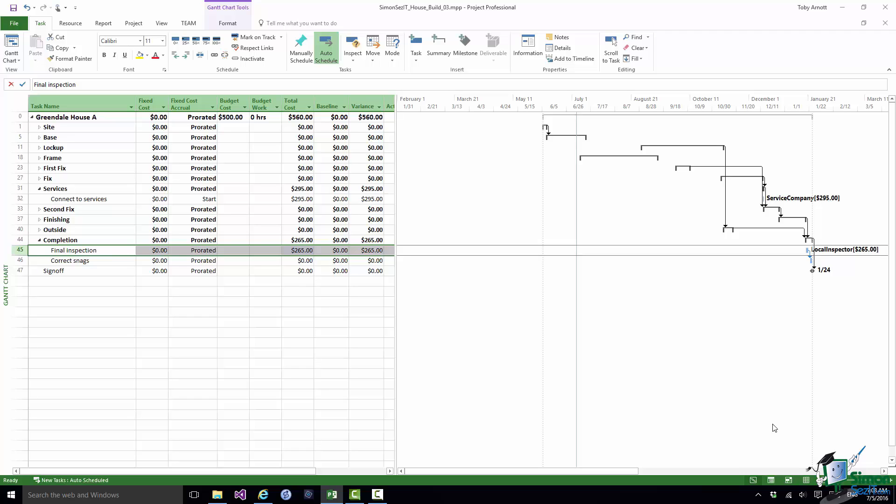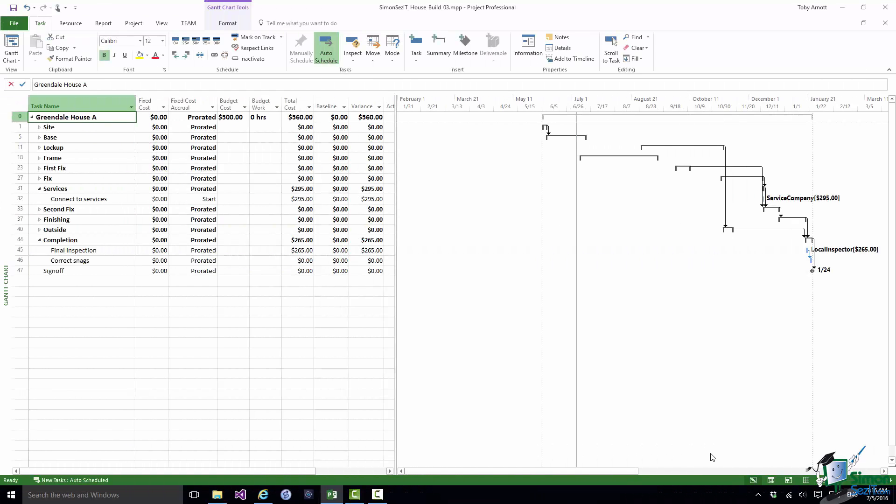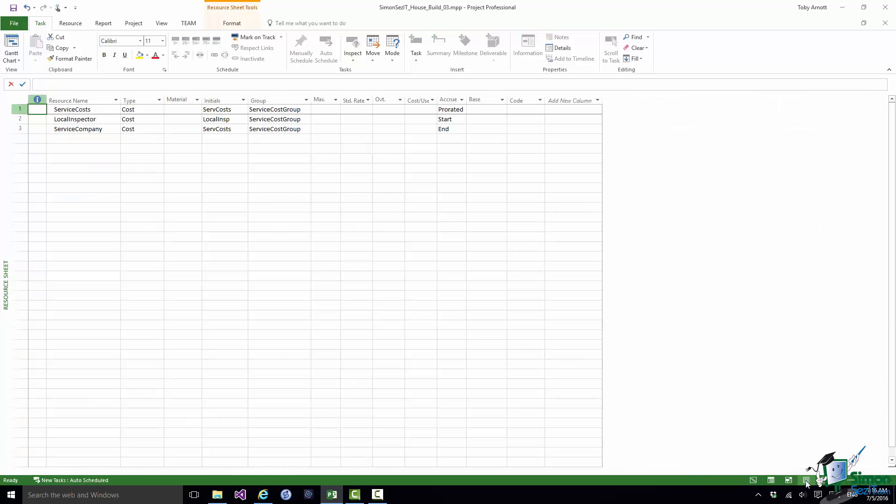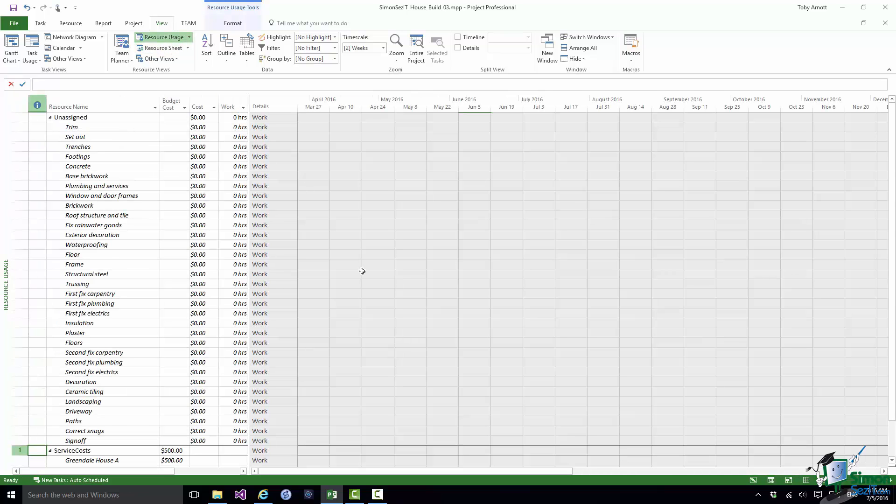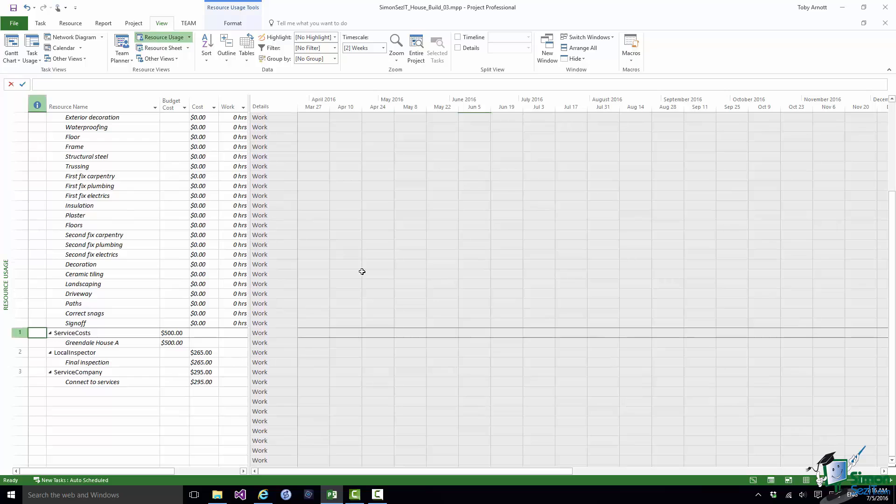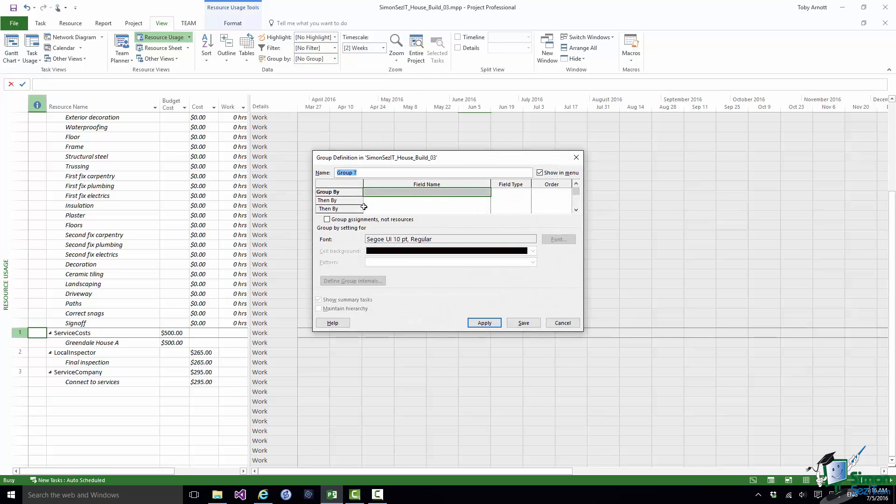Let's now see how we could report on this in a very convenient way. We're talking about budget cost here and the category we've been dealing with is a resource category. Let's go back to the resource sheet. There it is just with our three resources on it. And what we're going to show instead of the resource sheet is resource usage view. We are going to apply a group, so we use Group By. We're going to create a new Group By and we're going to use the Group field. This comes back to the point that I made a little while ago in that we could choose any of a number of suitable fields here. We might use the Code field or a custom field. On this occasion I'm just using the Group field. Click on Apply.